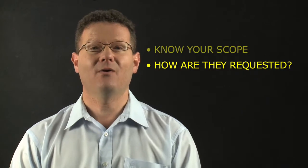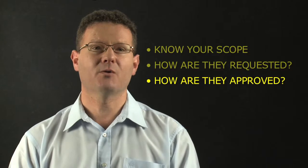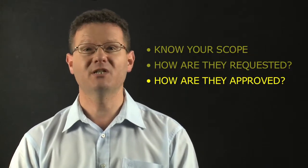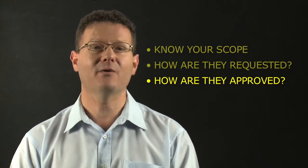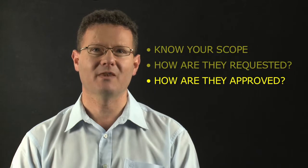All right, now once we know how variations are requested from your client, how are they approved? How is your client going to approve it? Is it going to be sign-off? Is it going to be oral? Does a particular form need to be filled out or is it by email? How are these things going to be approved? So that needs to be agreed between the parties.